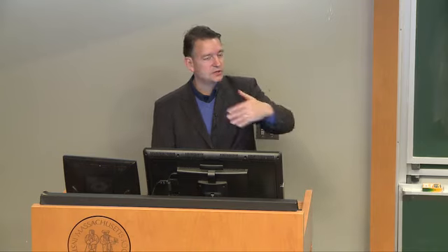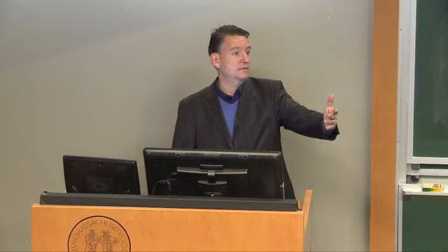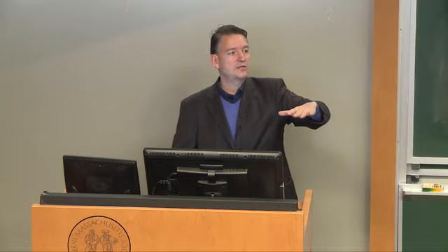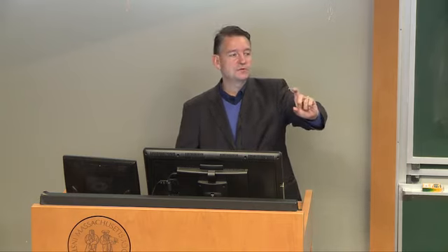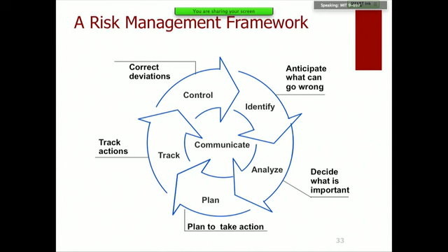Similarly, schedule slips can induce cost risk. As you slow down, you have what's known as the standing army cost, right? People are going to charge to your program even if it's at a reduced level. And that will also increase your cost. So lots of coupling here between risk categories.